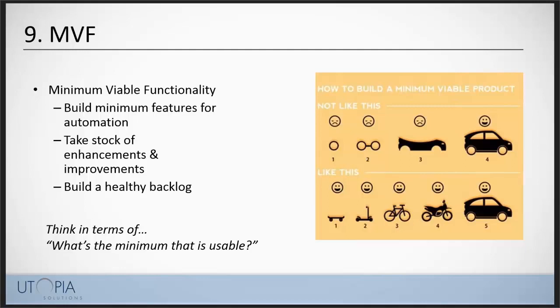And we have a project running right now that really enabled our customer to start using the test automation framework about 3 sprints into the project. It might have been 2 to 3 sprints in, and we realized that a number of the things that they wanted, or things that they thought they wanted, were less important, and elements in the backlog sort of got booted to high priority. So, your customer should define perfection. So what we did in that project is we booted stuff that they thought they wanted, that they found out they didn't want, into the backlog, and then some elements in the backlog replaced those things.